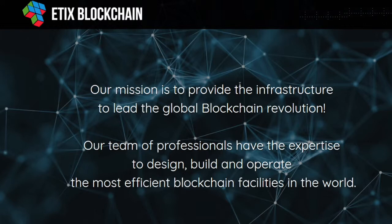And this particular company is a Japanese firm, and they really wanted to make it big in Europe. So we suggested that we'll find a location for them. Now, location services is one of the things we do. Globally, we look for the right location. But if you know blockchain and cryptocurrency mining, location is important when it comes to things like temperature and power. Not really anything else, temperature and power. It's really about efficiency and about low cost of ownership. So we scoured the right location and we found Iceland. So this location is a place called Vikjar, which is about 50 kilometers south of the capital, Reykjavik.